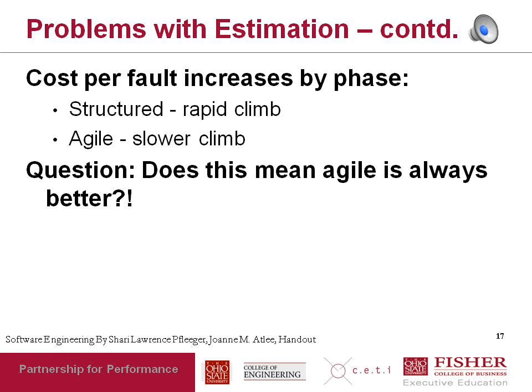Now, one thing to note is that in projects that use structured methodologies, there is a rapid climb of the cost per phase. So if you're doing, say, waterfall, then the change in the cost for including a new feature or fixing a new issue climbs rapidly when you go out of the requirements phase into the subsequent phases and so on.